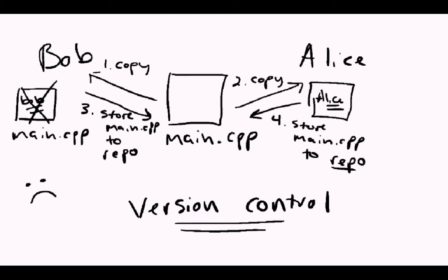Now, let's talk a little bit about peer reviews. Again, the goal is to remove defects, but a side benefit is that the team really develops a better understanding of the work product after a review. And it's important to find defects early, remember. You want to find defects in the development phase rather than the maintenance phase. It could cost 100 times more to fix something after the software has been released than before.